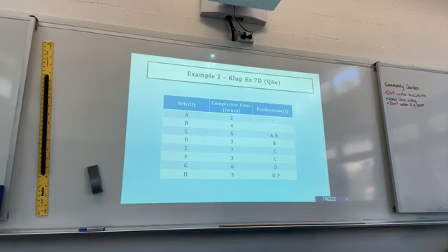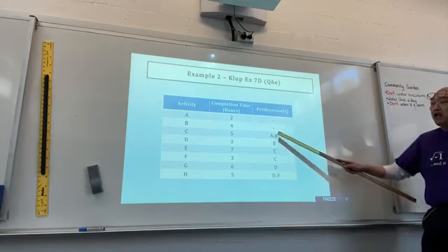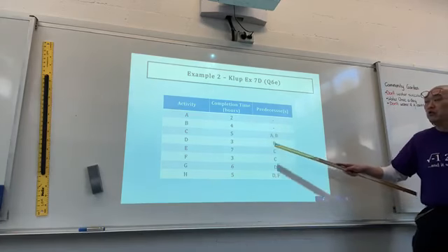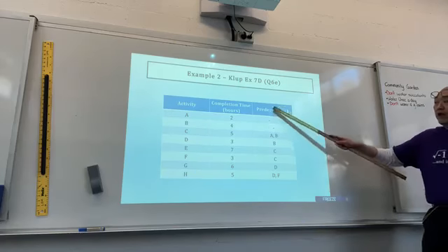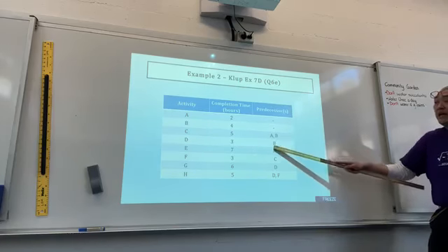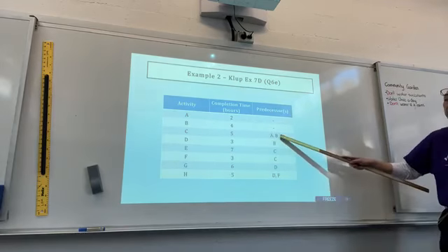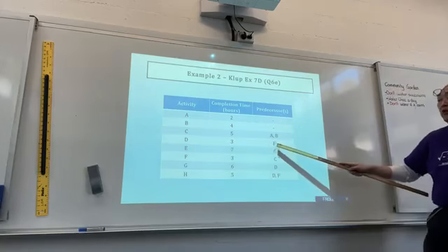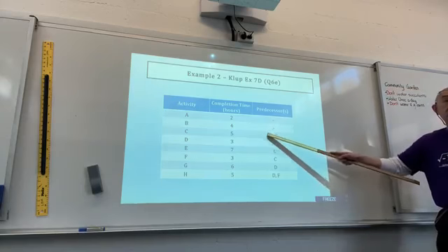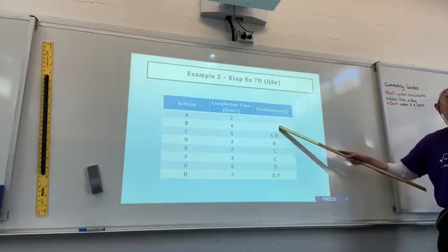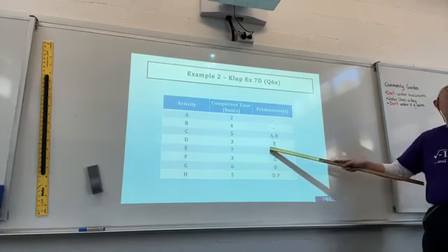Now looking at this, look at where you've got two activities going into one activity. Look at the predecessor. So here you can see that with C, you've got A and B coming in, whereas with D, there's only B coming in. So that's already giving you an indication that you may need a dummy activity.